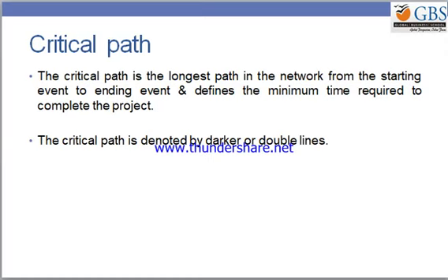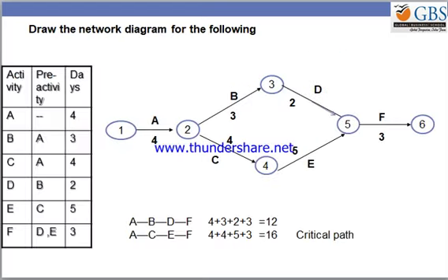Sometimes probabilistically we are going to take some possibilities, and this is going to tell us the monitoring of the project. So first, draw the diagram, second, go for calculating the critical path, which is going to tell us that we are going to complete this particular project in so much duration. Again, I'll go back and show you what we have done here. Look at it.